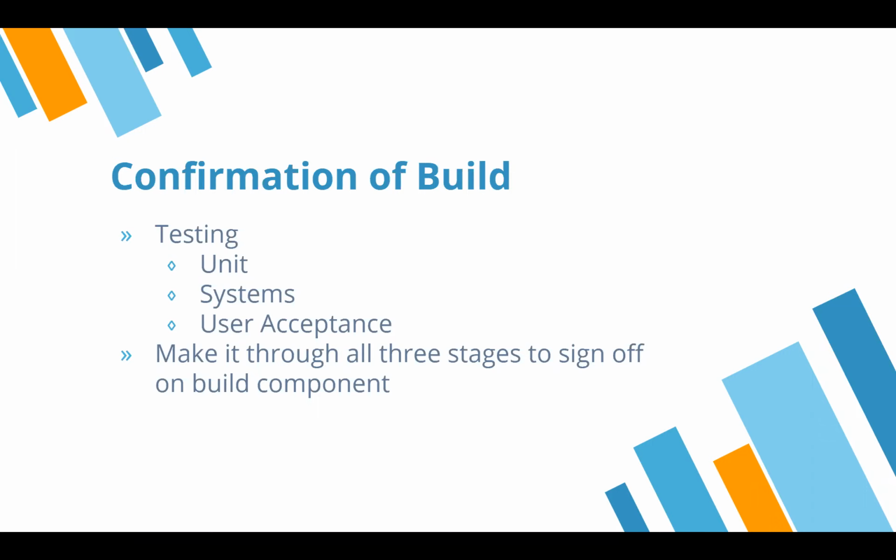So the other key piece here for user acceptance is to make sure that you test from all of those perspectives. You can't have a tester who just has HR access and says suddenly, well, I can see this. And it's like, well, the employee wouldn't see that, but they saw it. So therefore it becomes a defect or an error on their report, and ultimately that's a stop for you.